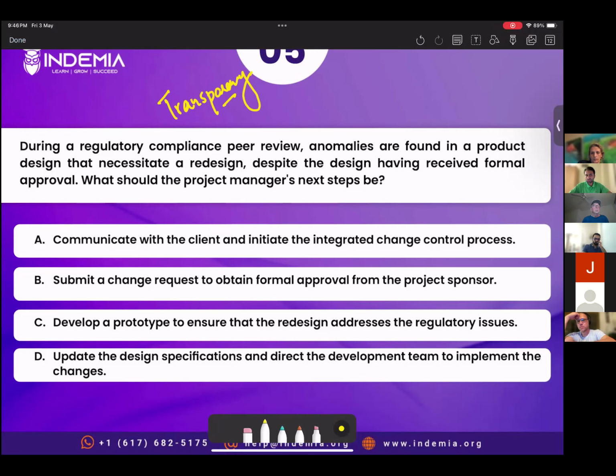And as I think Mary mentioned, we focus on transparency and open communication, right? It's similar to what we discussed in the previous sessions, where there was an inauguration and the vendor announced a delay. What would you do? You would directly communicate with the end users or customers or management: okay, this has happened. We won't be able to inaugurate, but we are trying to find a solution. So before jumping directly to the solution, we communicate so that all relevant parties are onboarded. They know this particular issue has surfaced, and now we expect delays, or we won't be expecting normal progress.